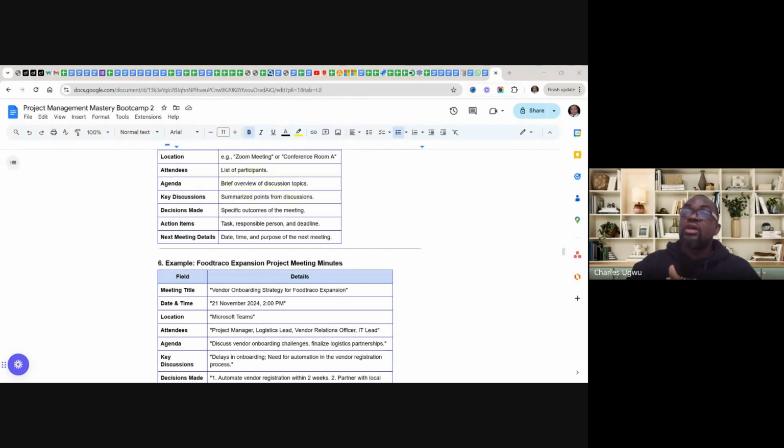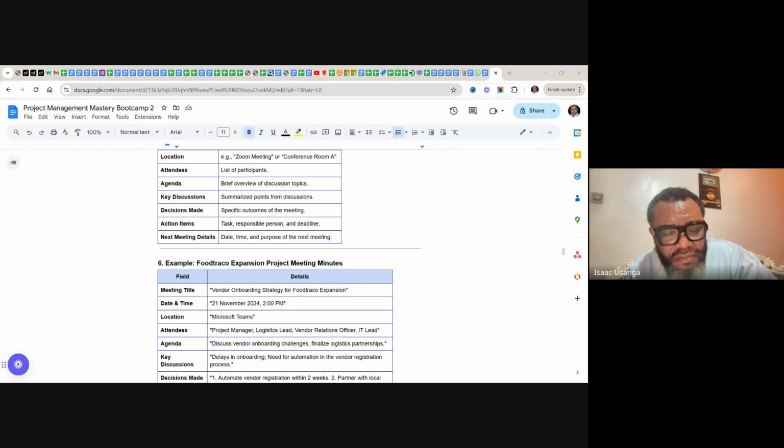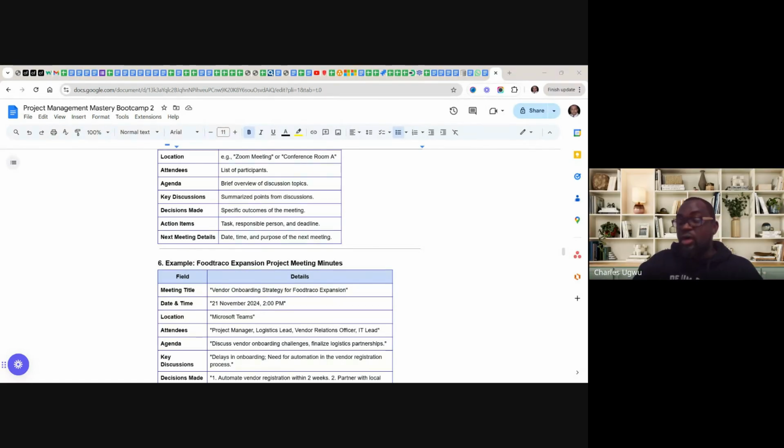And you have to keep a record of everything, so that tomorrow you know when they had this, because you are capturing challenges as well. You know when they had this challenge, and you know when it was resolved. Once you capture the challenges from them, you as a Scrum Master start working immediately to resolve or mitigate these challenges. So that is it. The meeting is structured. The meeting has created a template for itself, and if you are abiding by it, you follow it.